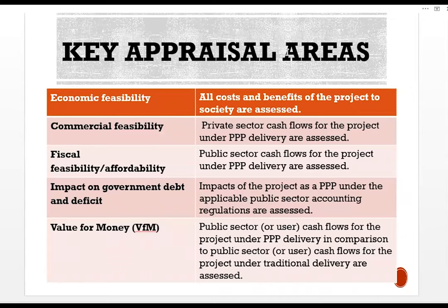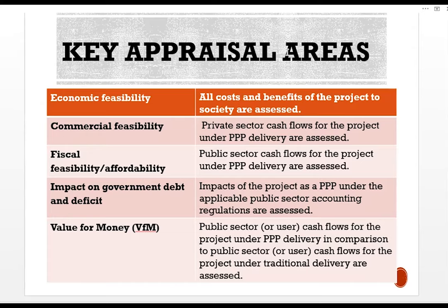Key appraisal areas include: economic feasibility; commercial feasibility, where private sector cash flows for the project under PPP delivery are assessed; fiscal, where public sector cash flows for the project under PPP delivery are assessed, including impacts on government debt under applicable public sector accounting regulations; and value for money (VFM), where public sector or user cash flows for the project under PPP delivery are compared to public sector or traditional delivery costs.